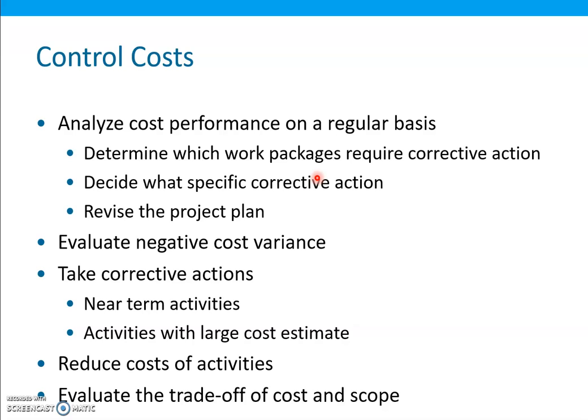So cost control includes the following. First of all, analyze the cost performance to determine which work packages may require corrective actions, and then decide what specific corrective action should be taken, and then revise the project plan, including time and cost estimates, to incorporate the planned corrective action.